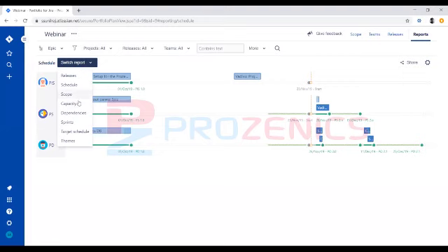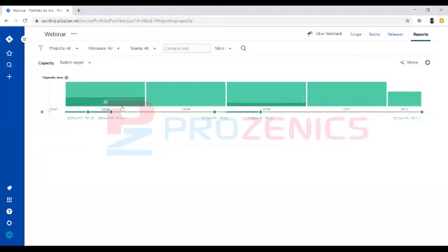And capacity. Here we need to first set what is the capacity that we have for our teams, maybe with respect to story points. So if you are burning high, Jira will be showing you whether you are under-utilizing capacity or over-utilizing based on the team's input on each sprint.